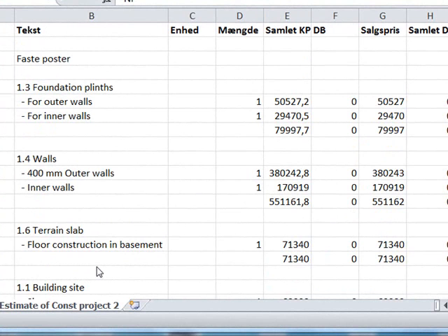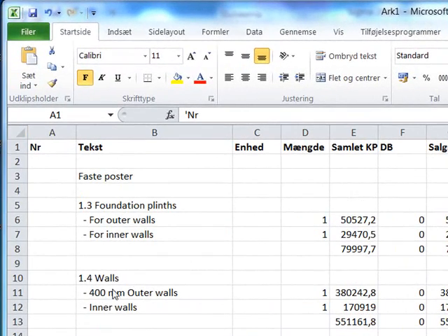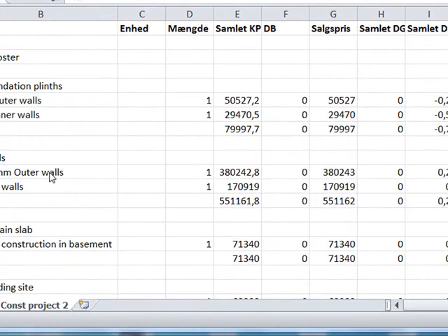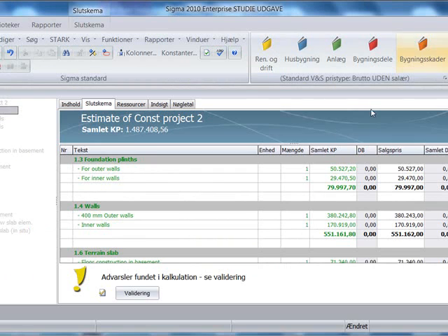network diagram. If you want to work without sending the calculation directly to MS Project, then you can use a network diagram view where you put these activities in. I suggest you start off by using some post-it pieces of paper and putting this up as a group into a network diagram. So use your post-it pieces of paper to put on these activities, and then use a big piece of paper on a wall and place the post-it on the wall, and then you can transfer that diagram into MS Project by going into the network diagram.